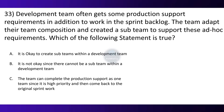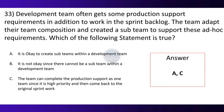Question 33. The development team often gets some production support requirements in addition to work in the sprint backlog. The team adapted their team composition and created a sub-team to support these ad hoc requirements. Which of the following statements is true? Option A: It is okay to create sub-teams within a development team. Option B: It is not okay since there cannot be a sub-team within a development team. Option C: The team can complete the production support as one team since it is high priority and then come back to the original sprint work. The correct option is A and C.